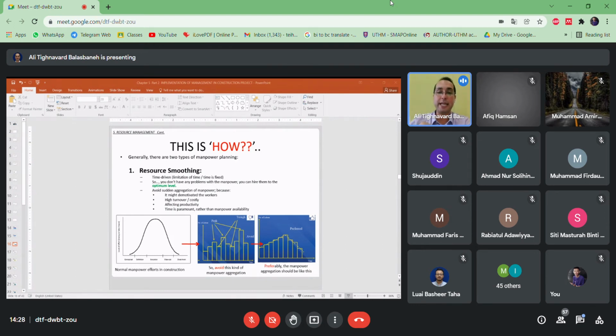The first day, second day, third day, it goes up, but on day 4, it came down. Again, on the 5th day, it rose and then decreased again for 2 days. So this type of resource management for a project is a very poison. It's killing the project.